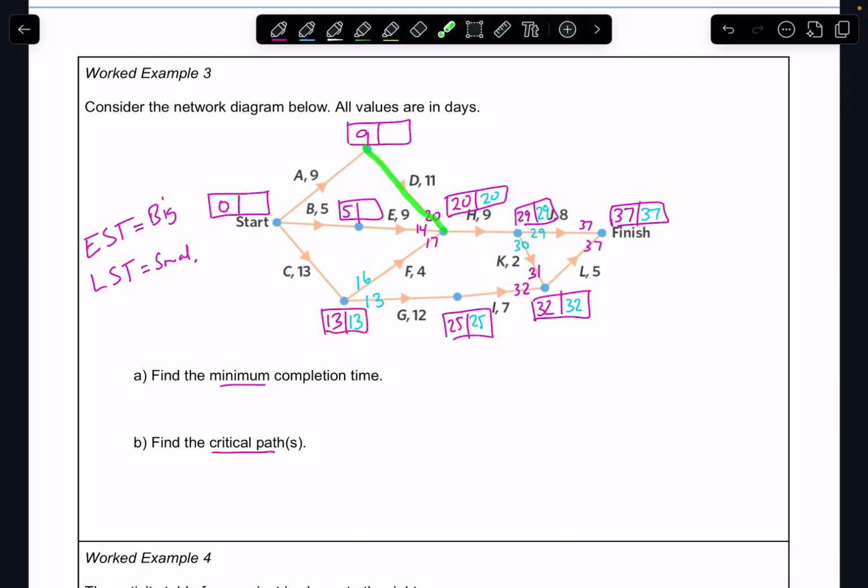Let's go this way now. So if we go 20 take away 11, 20 take away 11 is going to give me 9. And now I've got 3 going into here, don't I? So you might see 3 boxes, but I'm just going to do it on the lines. So if we go 13, take away 13, we get a 0.